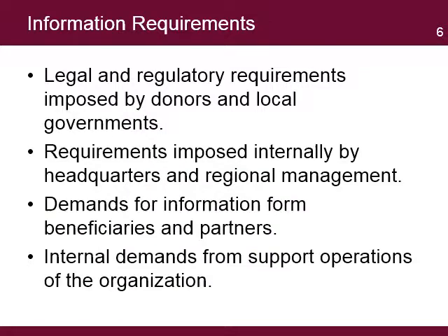A project's information needs are dictated by legal and regulatory requirements imposed by donors and local governments, requirements imposed internally by headquarters and regional management, demands for information from beneficiaries and partners, and internal demands from supporting operations of the organization. Each of the above areas should be examined in detail to specify the project information needs. In this examination, consideration should be given to both short-term and long-term needs and both regular and ongoing temporary needs.